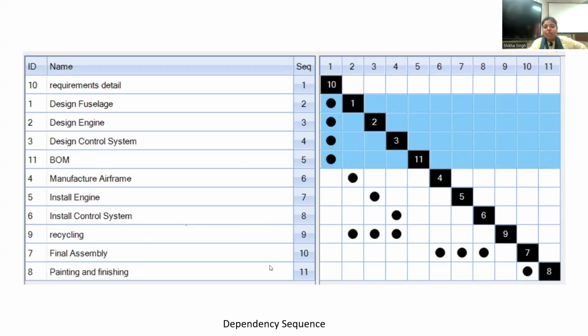I think it is an iterative process, so this is just one iteration, because I just noticed one thing here, that there is one more empty row. So this iteration was required once again. The ninth column is also empty. So these two activities should go towards the end, right? Because they are not giving information to any other activity. So these empty columns, the 11th and 9th, should also be moved towards the right hand side of this matrix. So it is just the first iteration to see how things are working, right?